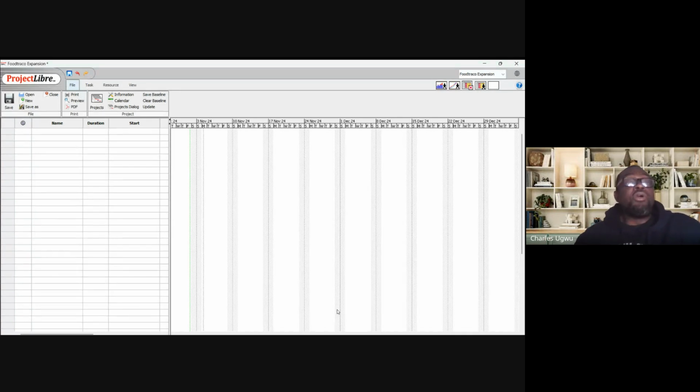So the first thing I did is to go to the ProjectLibre. I went and clicked new to create a new project. And I clicked that, and it brought out a small dialog box where I entered the project name. I entered the project manager's name, and I entered the start date. And I click OK, and it brought us to this where we are. That is number one.